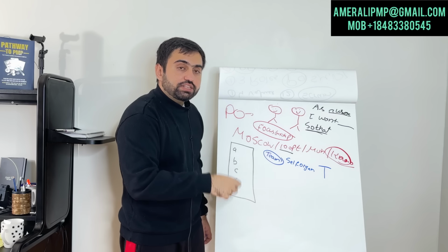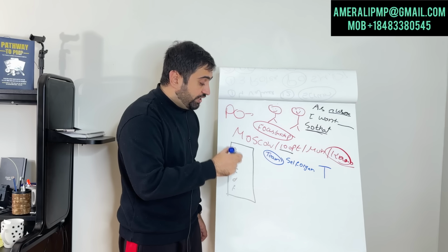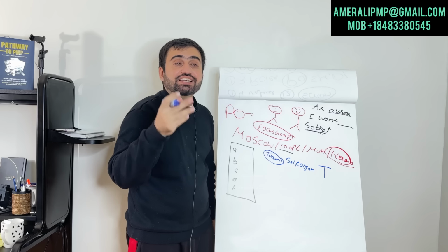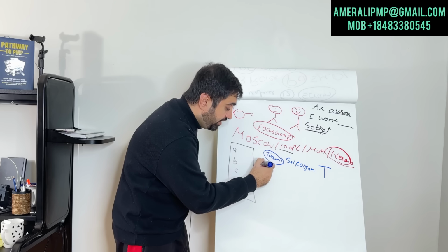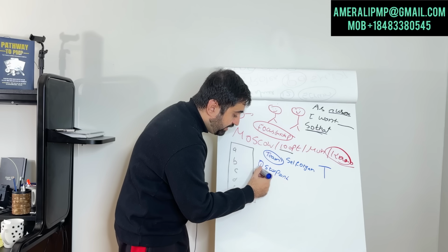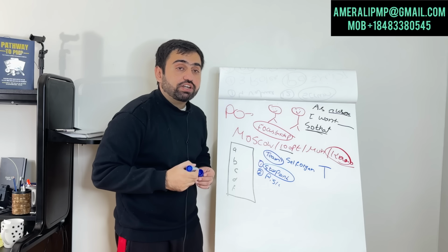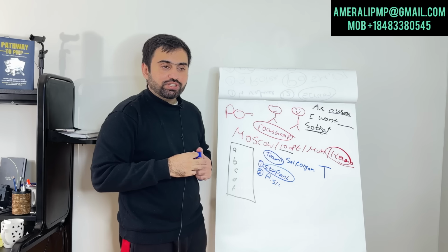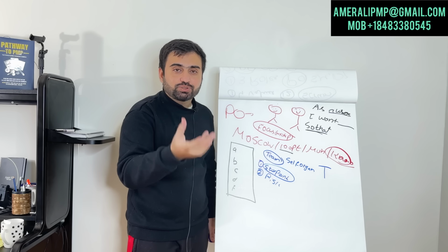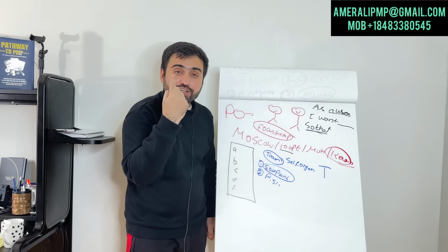They will look at each user story, and they will tell what the story points of each user story are and what the risks in each user story are. So they will tell story points and risk in it. What is a story point? Story point is the effort required to complete a user story. In simple terms, how much time it will take to complete the user story. The story points will cover how much effort it will require to complete one user story.